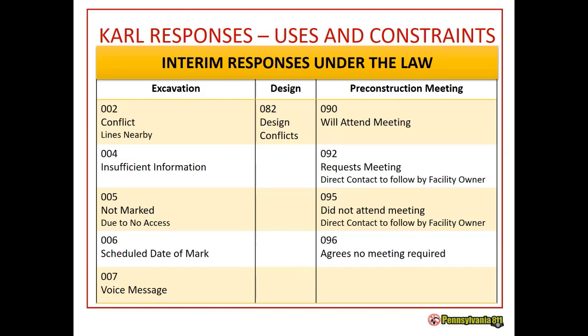And we have 006, scheduled date of mark. Facility owner marks the lines at the site based on the agreed time and date. Also, we have 007, voice message. The facility owner left a recording to convey information about the locate that is different than the standard KARL responses.